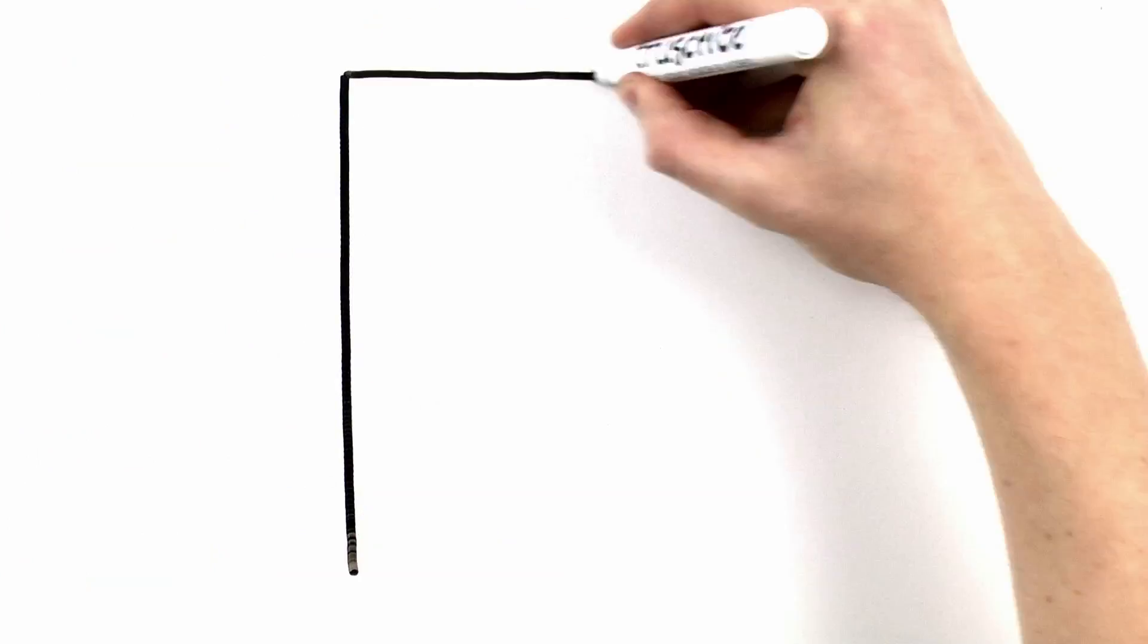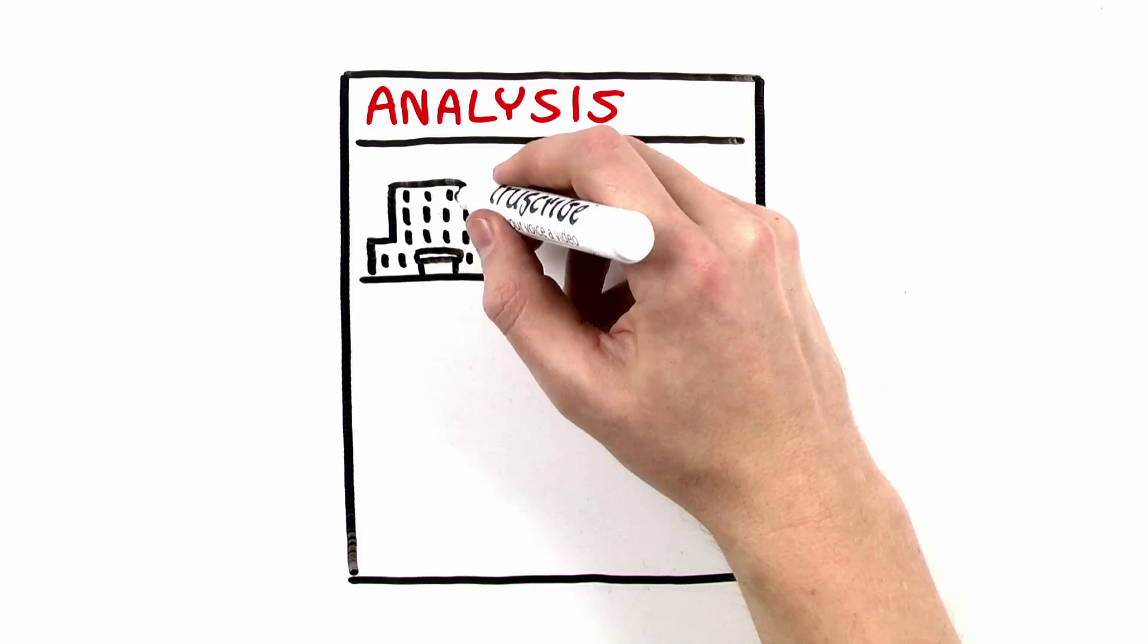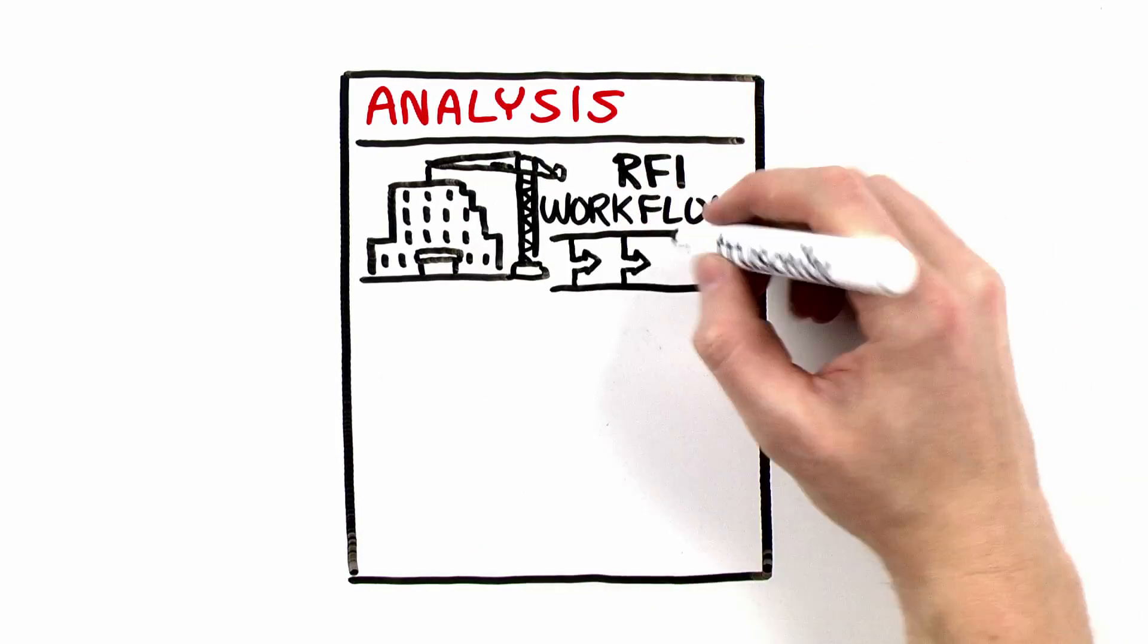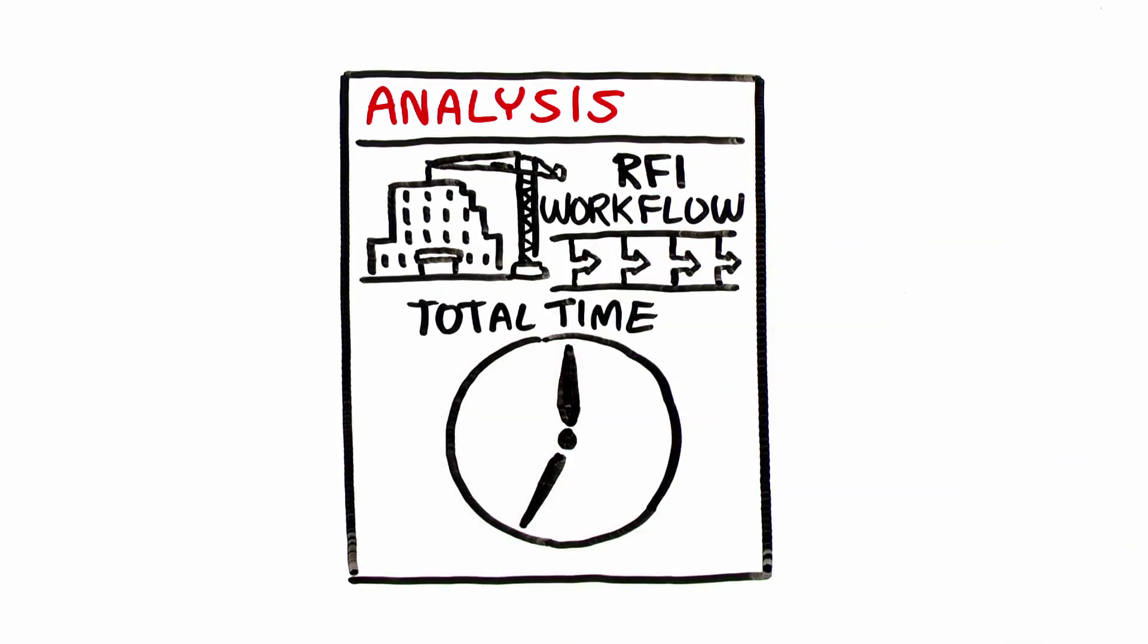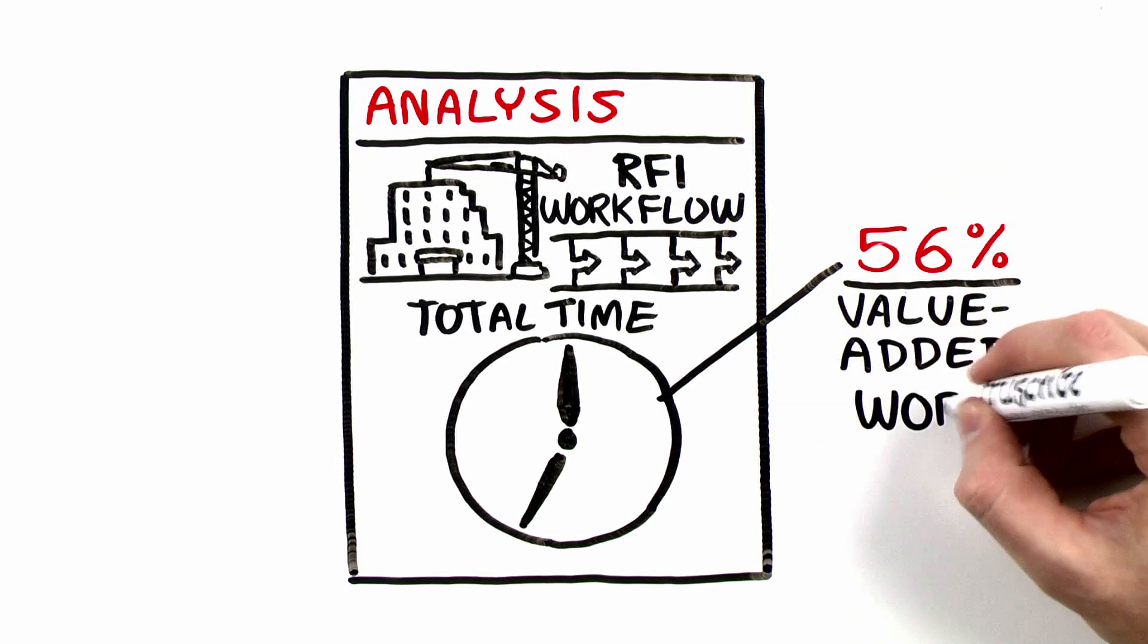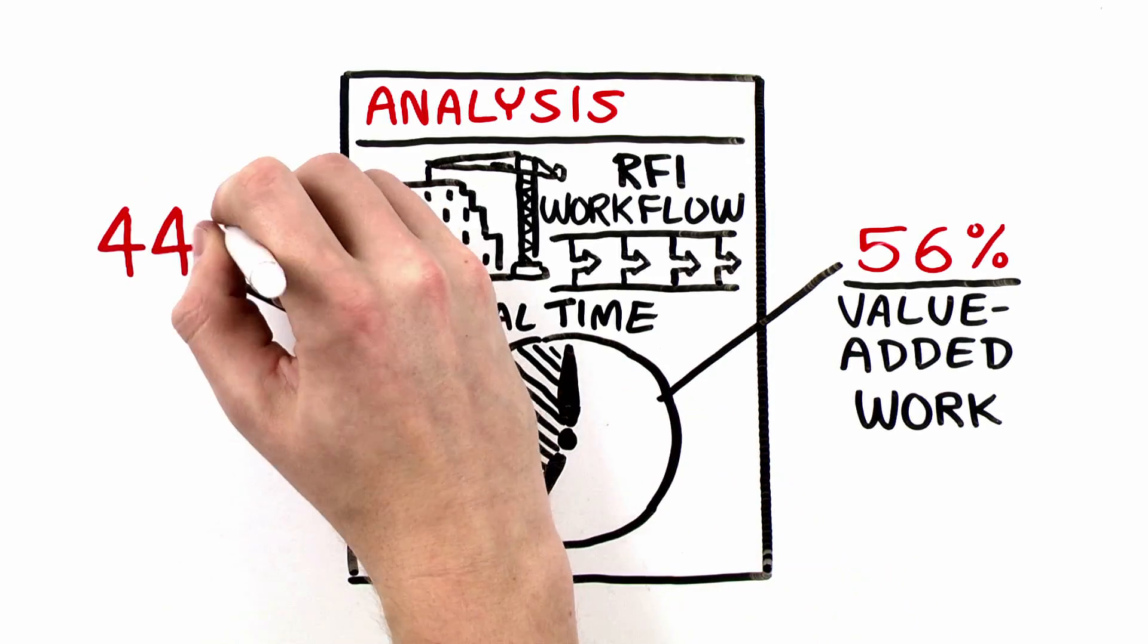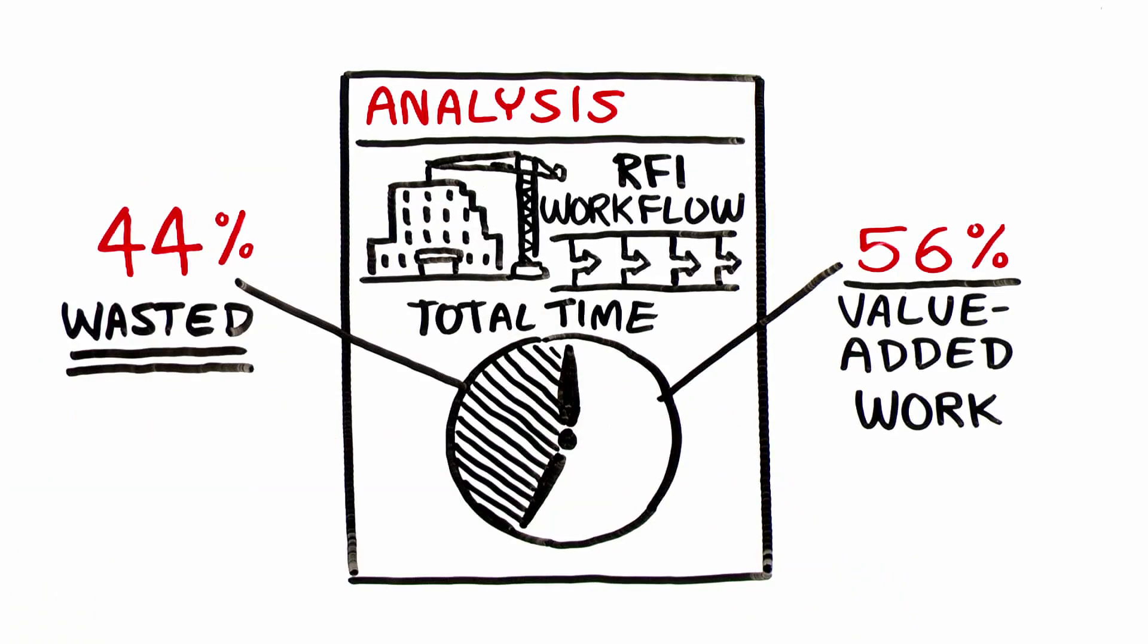A recent analysis of a major U.S. contractor's typical RFI workflow showed that, of the total time taken to complete the process, only 56% of the time was spent on value-added work, while the remaining 44% of the time was wasted.